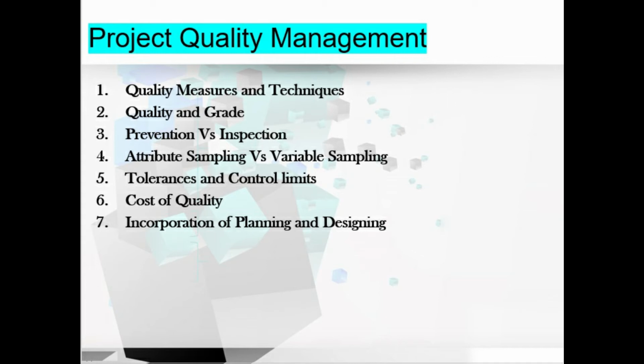Moving to cost of quality, which is very important. The cost of quality includes all the cost incurred over the life of the project by investment in preventing non-conformance to requirements, appraising the product or service for conformance to requirements, and failing to meet requirements, that is rework. And cost of quality is often the concern of project management and also portfolio management, the PMO and the operation. This is about the cost of quality.